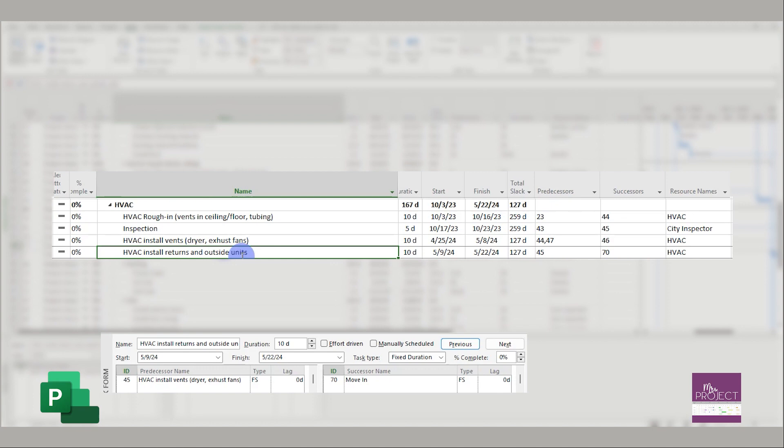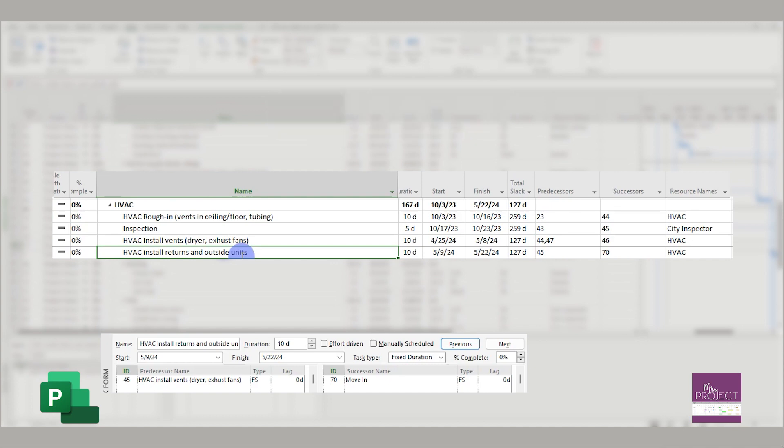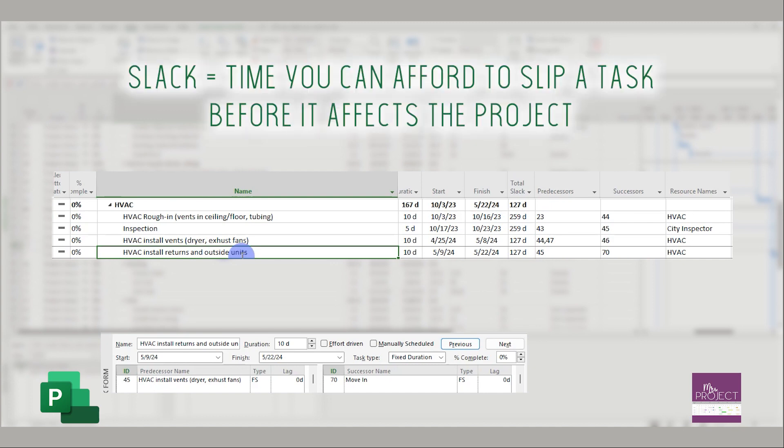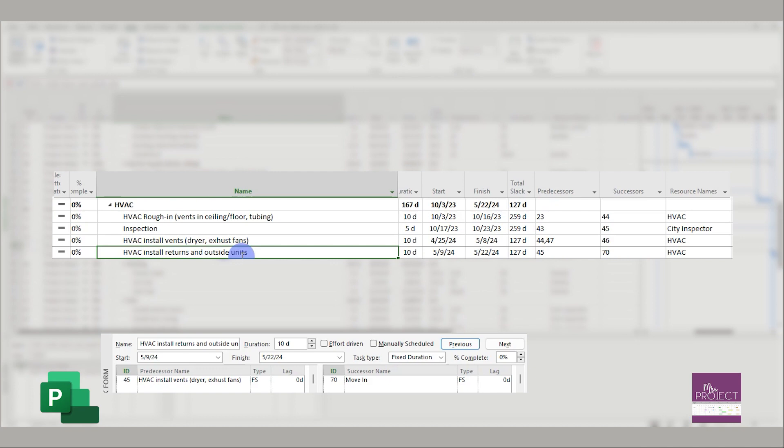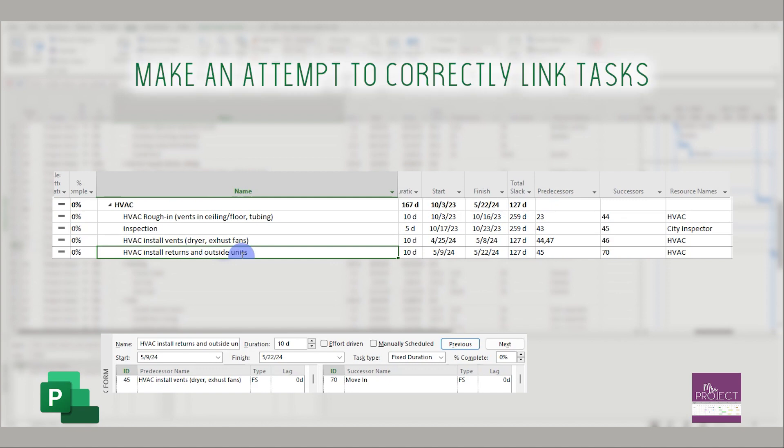Again, DCMA's metric is just making you question the logic. If this is correct and it says yes, you have that much slack, then you know you do and you can slip the task by that many days. But you really do want to narrow it down and control how much slack you have. So try and narrow that down. Try and find the correct relationships between the tasks to get that total slack down.